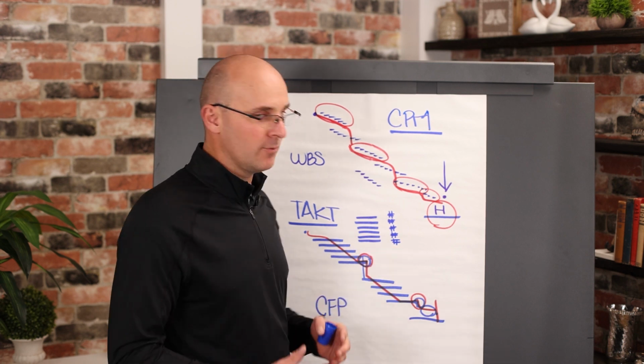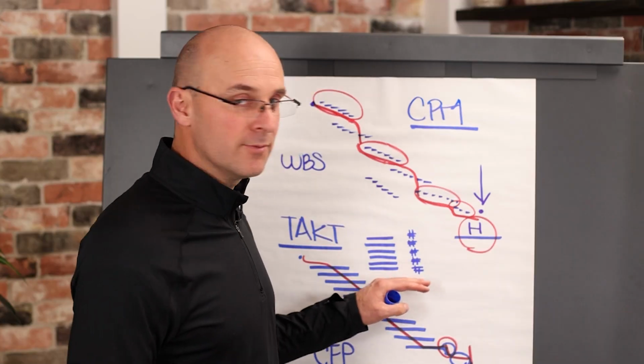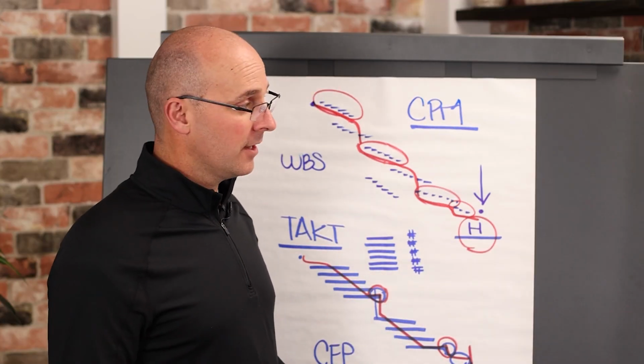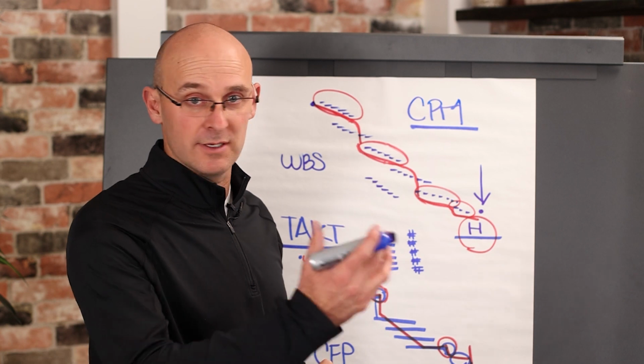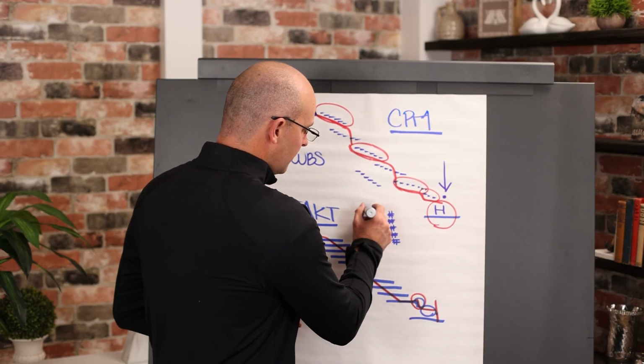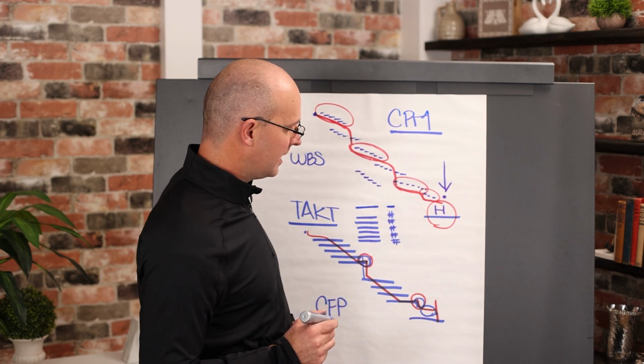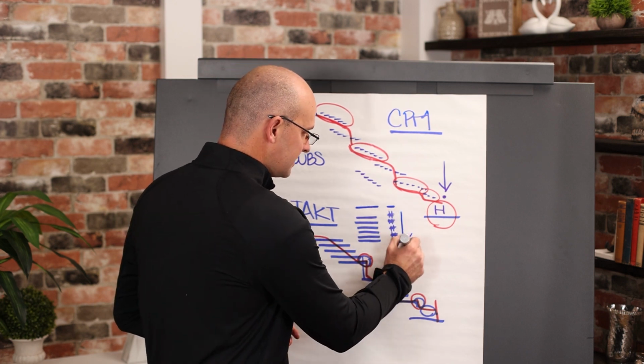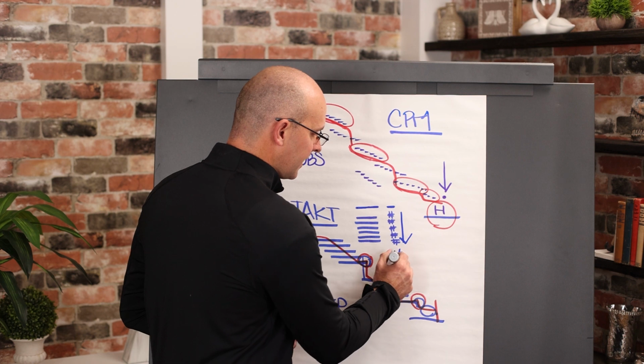Now I can't finish my project. We're not talking about that. We're talking about normal construction delays: not having enough manpower, materials not showing up, something showing up wrong. Normal delays, right? What are the risks and how many days would that represent? So you go through that list and you take your largest number, okay?